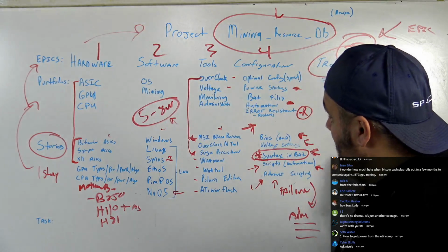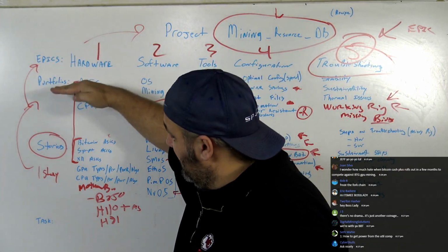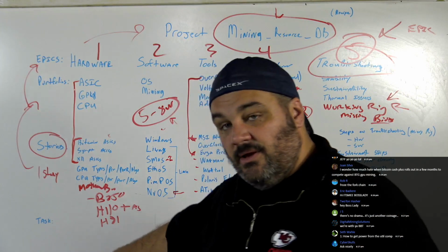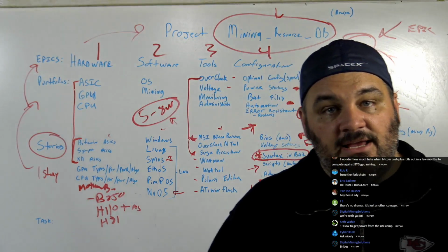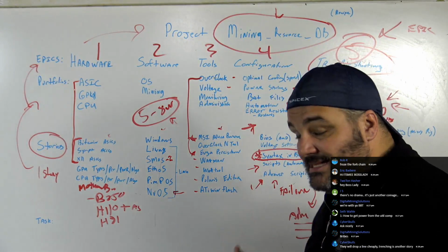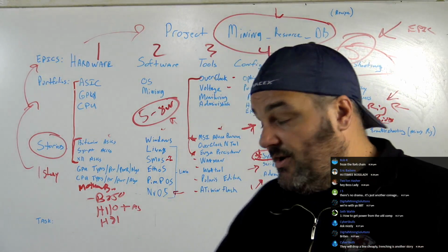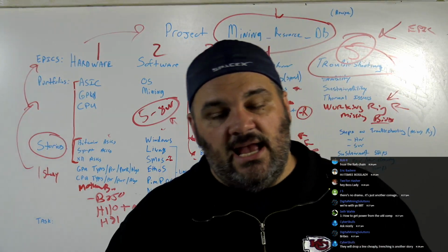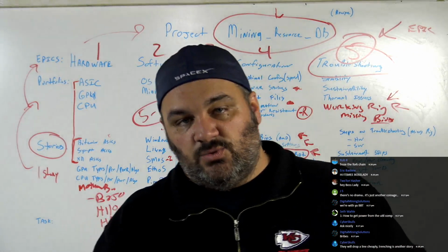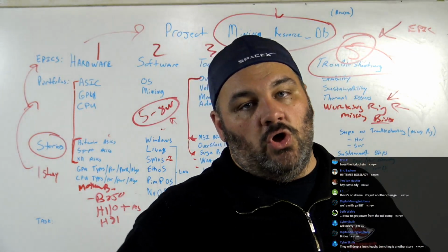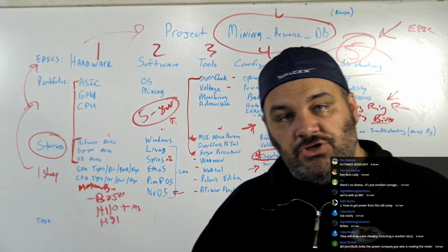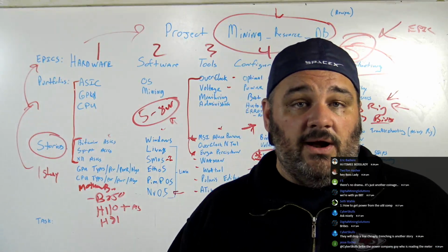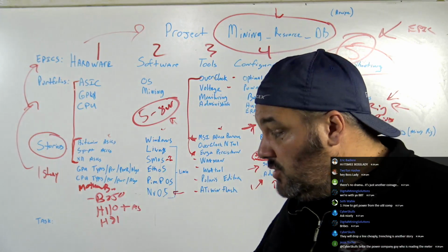This is the basic layout and structure from an epic, a portfolio, and a story level. The levels after that are tasks and bugs and issues, right? In this context, with information sharing like this, if we have something on here and it's not working the same way, someone can say, hey, you say this is the way this works, but it doesn't work for me. Here are my results. We can flag that as a bug or an issue and say, maybe we can try to fix that, or what was your fix? If we don't have that hardware and you ended up fixing it, then we can close those issues out.